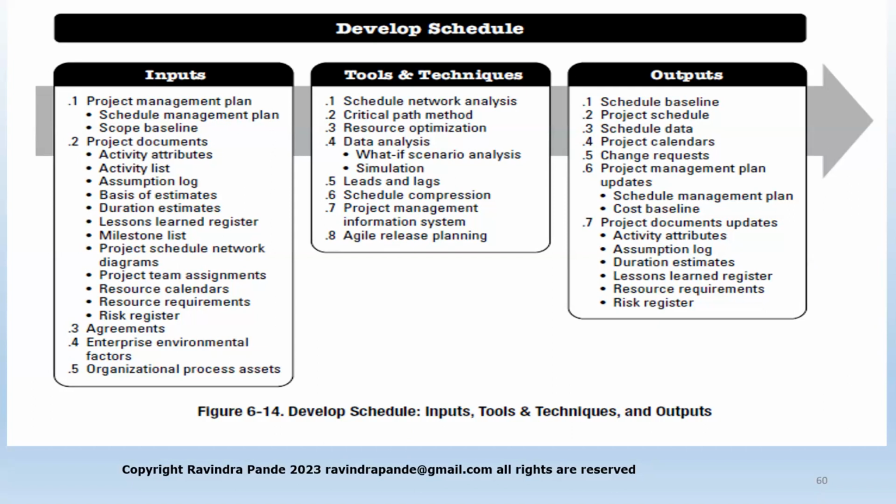Normally a sprint which we have developed as a plan, the current sprint is kept constant so that the overall planning might not get disturbed. So whatever change request is of the highest priority, we normally put it in the next sprint, and so on and so forth. We'll study this whenever we do the hands-on project management plan on Microsoft Project.